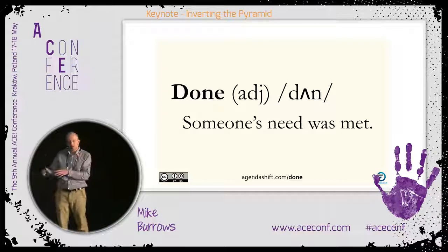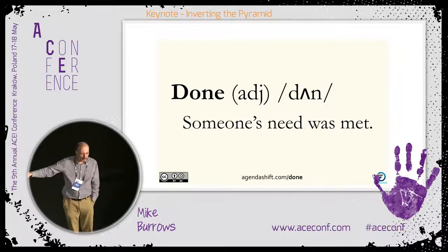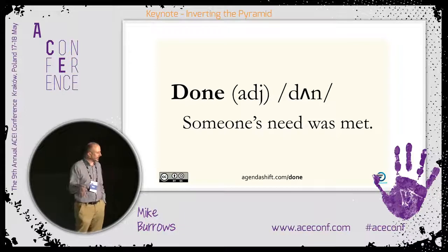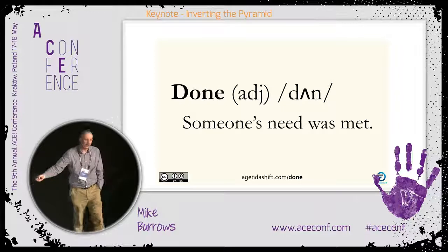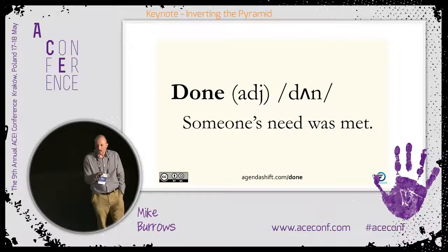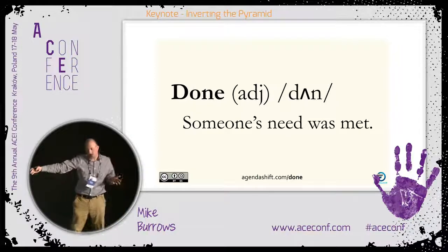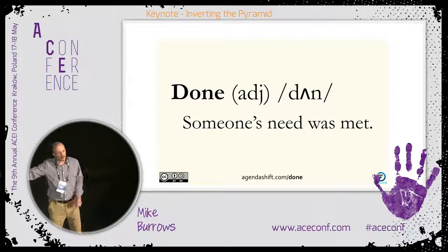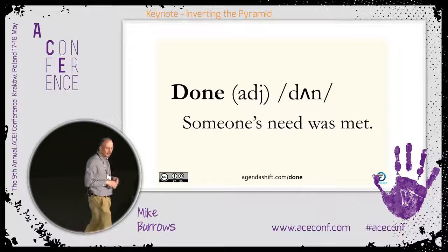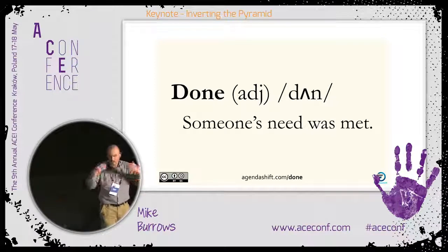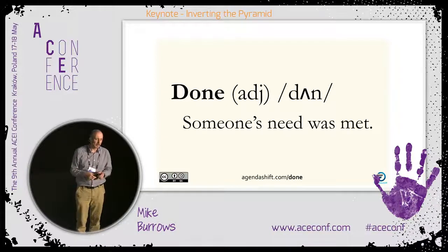All our last-minute implementation work was focused on a happy outcome. The customer would get involved in the testing, making sure that the conversation wasn't going to be an embarrassed one. They would keep half an eye on the development work, and they would be very careful about what they prioritized because they knew that this conversation was coming at the end. So if you start with how you would like to validate it, and make sure your whole process is working towards that happy outcome, it can have a fundamental effect on your process.